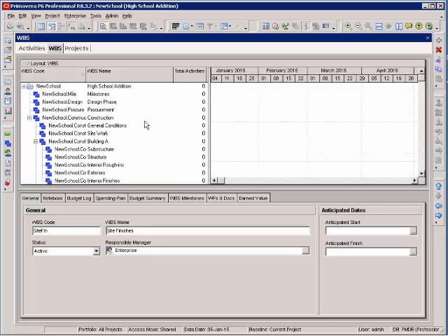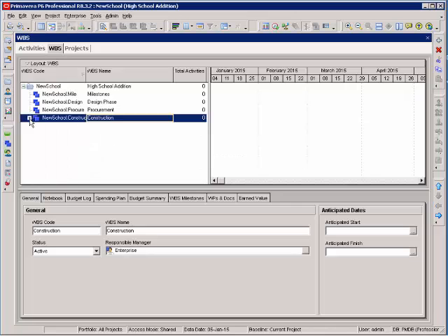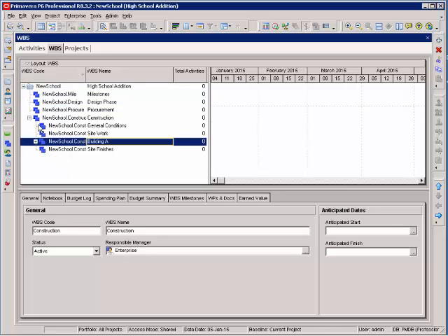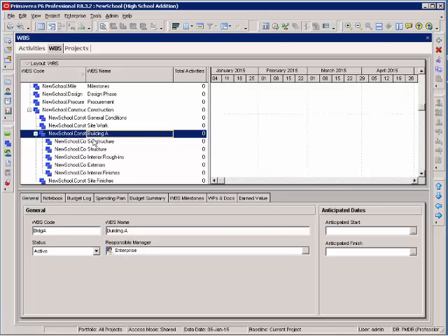So once again, look at my work breakdown structure. If I summarize construction, I have four elements in level one. I have four elements of level two, general conditions, site work, building that I want to build, and site finishes. In my building, I have five categories, my substructure work, my structure, interior rough ends, exteriors, and exterior finishes. The more detail you have in your outlines, the fewer activities you have in your work breakdown structure, making it much easier to schedule.